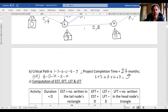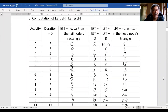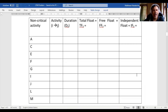We already determined the critical path and the activities involved are B, D, H, K, and N. This means all other activities are non-critical: A, C, E, F, G, I, J, L, and M. So these are the non-critical activities we will be working with.